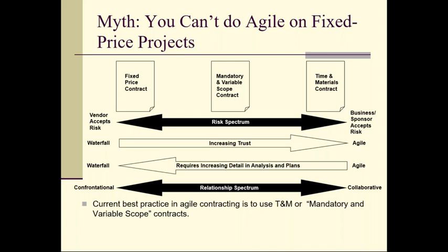I will put in a buffer that will cover a significant amount of scope, usually all the should-haves and a few of the nice-to-haves, so we can have some extras in the project. Now, how do I estimate that? Well, this story point estimating approach allows us to assign a number of points to each feature. This feature is easy, it's 1 point. This feature is big, it's 37 points, right? We're able to scale them so we get an understanding of the big, huge ones, the little ones, the medium ones, and we can start to understand the differences.